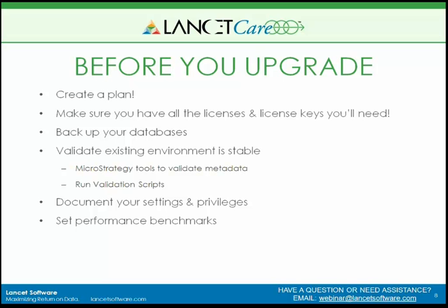Basically, this is a checklist of things you want in place so you can get started right away on the upgrade. So these bullets are a subset of our pre-upgrade checklist. Things like having the proper license keys, as well as downloading the install files to the intelligence server. That's something that can take a day or two, especially getting the licenses. And you want to have those in place before starting.